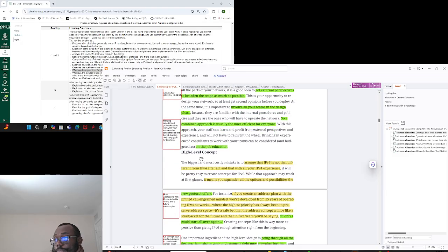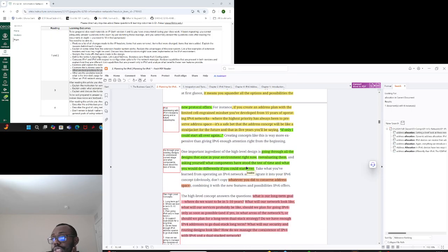Okay, then you now come with your high level, which you call the HLD. So HLD will look at which are the areas you want to get IPv6 deployed, what are the nodes, what interface will be required. So you plan your HLD mostly, you draw at a high level what is going to connect to each other. So you build that HLD.